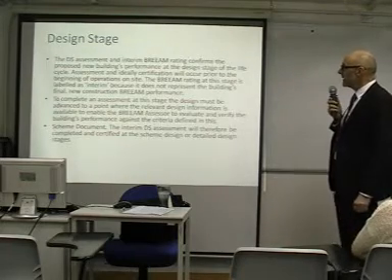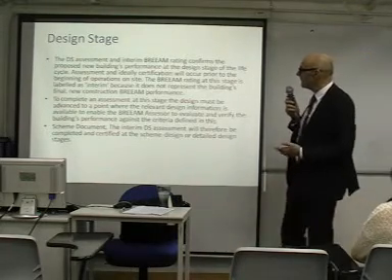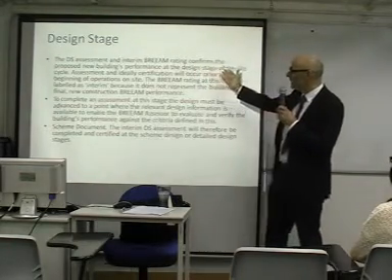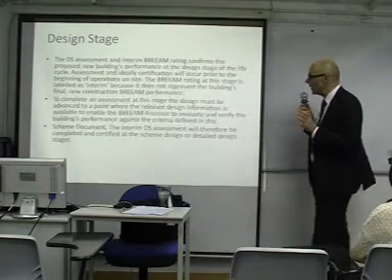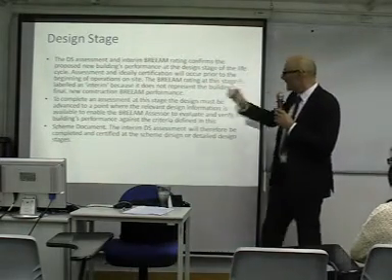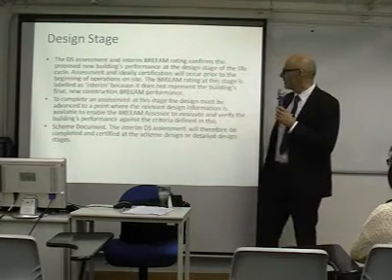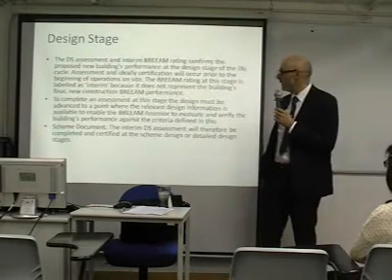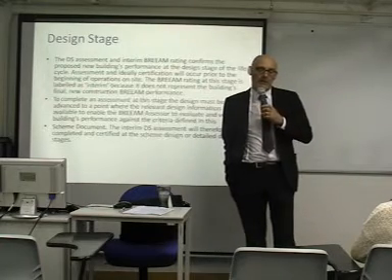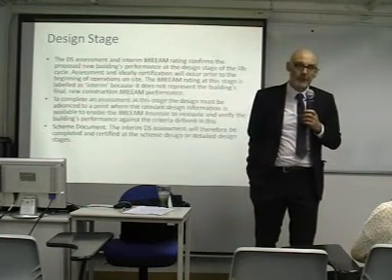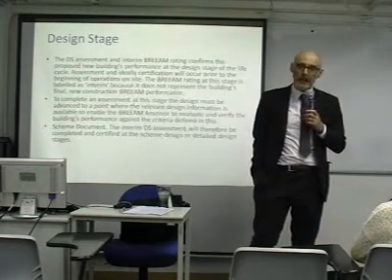Design stage assessment and interim BREEAM rating confirms the design performance can meet the requirements of the life cycle early on. It's called interim because it doesn't represent the building's final new construction performance. So when it's on paper, it's one thing. When it's actually put in place on site, it's another.